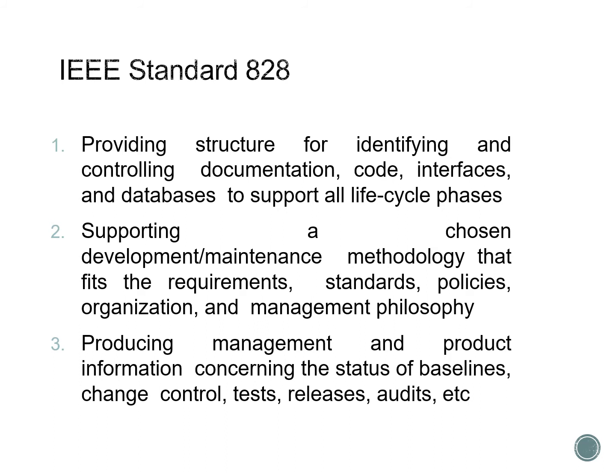These items have versions. These versions go linearly up so that you always know which is the more recent version, which is the version you need to use. When reaching certain milestones, you select certain versions of these smaller subsystems and define that this set of items is our current version or the baseline version.